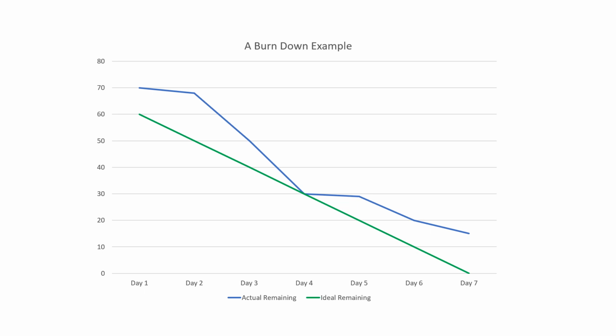The reason being, when the projects get initiated, so in the starting phase, the progress is little slow because people are trying to understand about the work, and then projects are at their top notch speed during the execution phase. So between day 2 and day 4 here you can see very good progress, and then we will see what is the reason of the flattened line between day 4 and day 5, because this burn down chart doesn't tell you whether any additional work was added in between.